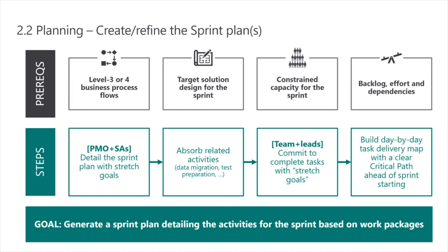And the data migration team essentially is then feeding the project team the data they require as you go through the project. It's not a big bang at the end where they say, right, we finished with data migration now, right? It's an incremental delivery. So you can do things like end of sprint validation. You can do training as you go through. You can do validation of the system as you go through.